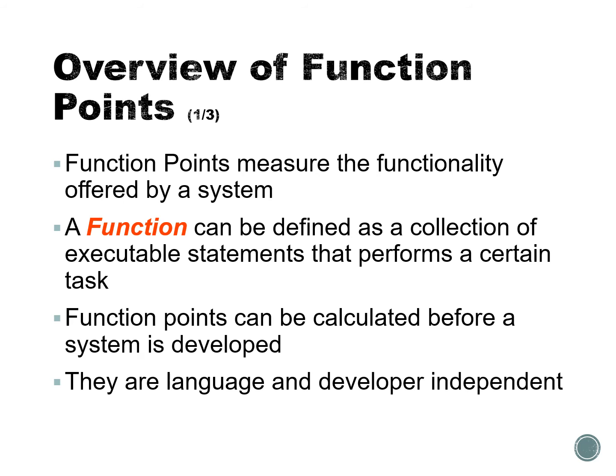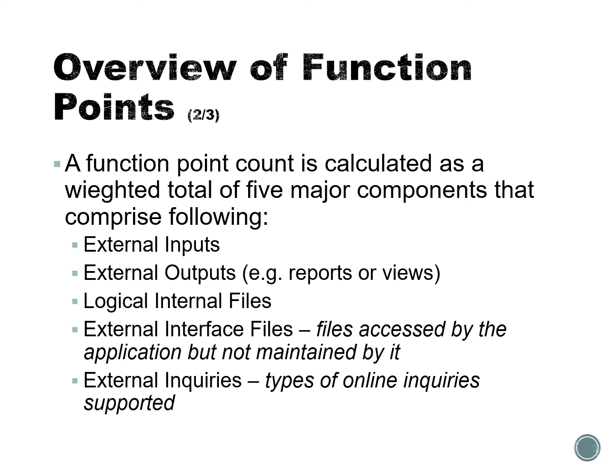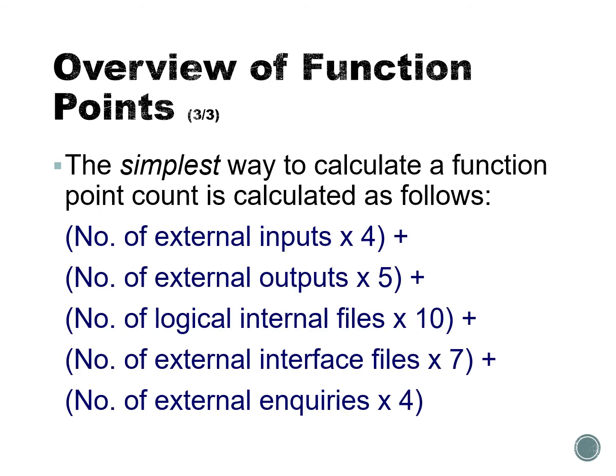And these don't even care about the programming language or anything, because it basically takes into account the external inputs, the external outputs, internal files, external interfaces, and external inquiries. How many of these things the module has. So basically, you count the amount of them, and following this formula, you get a number. The number doesn't have any relative importance. The only importance is that the higher the number, the more relatively complex the component is, and of course the component with the highest number is the most complex part.